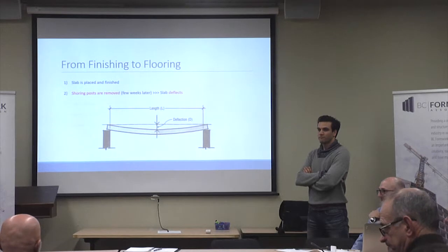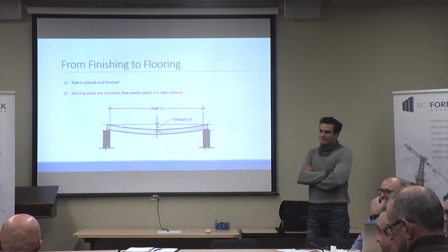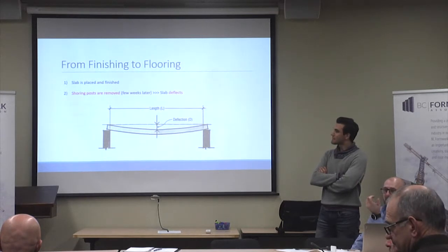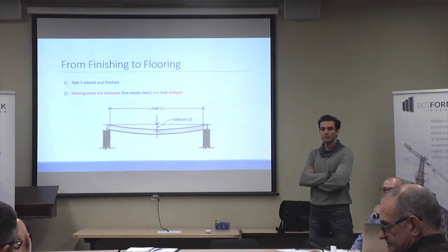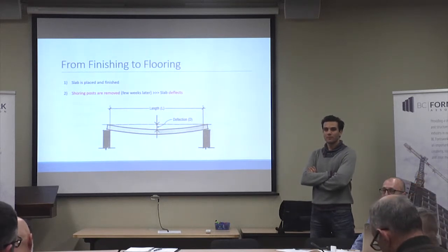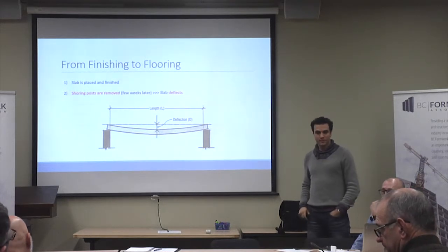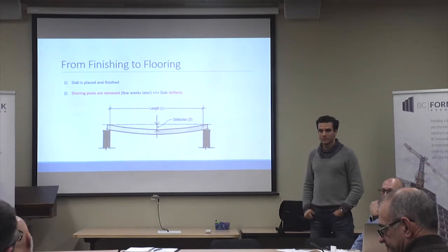Doesn't matter, it will not work either way. I'm just saying that it used to be, so that would give us some leeway, but now they're making it even tighter, plus they don't move the schedule ever. Right, right? You have your typical floors, when you're putting the top floor, usually using a couple of structural companies, Loudon Simpson, Read Jones, asking for reshoring now. Your last floor under the reshoring will be one month old. There's only one that is 28 days old concrete. All other ones are green concrete.